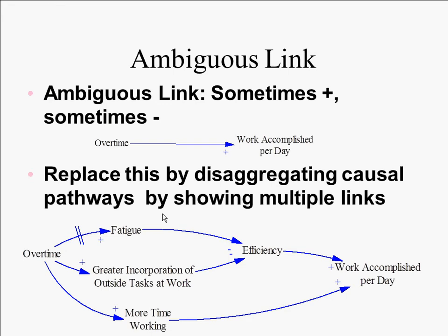It's easy to fool ourselves that we're ahead of the game. We're cranking out code, we're working 16-hour days, 18-hour days, code is cranking out. And of course, what we don't see is the bugs piling up, because we haven't diagnosed them yet. And by the time we hit them, it's often too late, in the sense that we promised a certain delivery date and so on, and now we've got to work through the bugs, and we've been operating on borrowed time. We've been fooling ourselves to think we're ahead, maybe making promises to the client, and now we're in really bad straits.